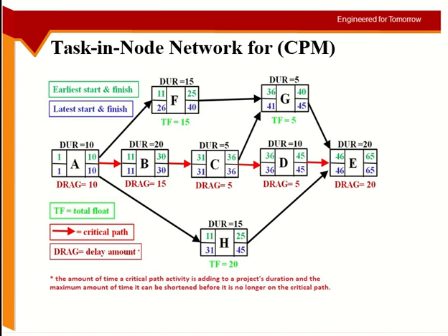Okay, and if you want to see how much an activity can be shortened, you have to look at the parallel activities. So with B I have parallel F and H. If I shorten B up to 15 days, it will still be on the critical path because other activities are still equal or more than this. But if I make it 14, then I have other parallel activities which are longer, so they will become the critical ones, not B.